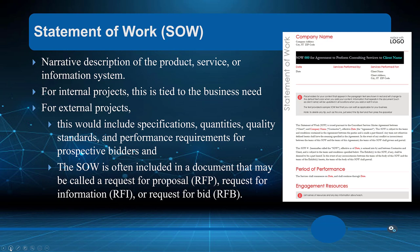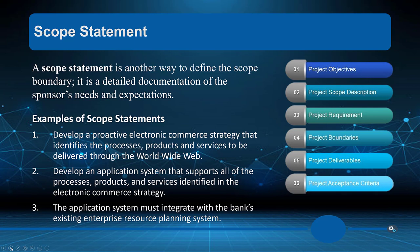For internal projects the SOW is tied to the business need; for external projects it includes specifications and quantities. If we're a consulting firm with an external customer, we need a completed process — receiving a request for proposal, returning a bid, and having it accepted — which means we've created a detailed scope and WBS that we're expected to deliver. This prevents scope creep and avoids adding features that increase our budget outside the customer's expectations. The same discipline applies internally.